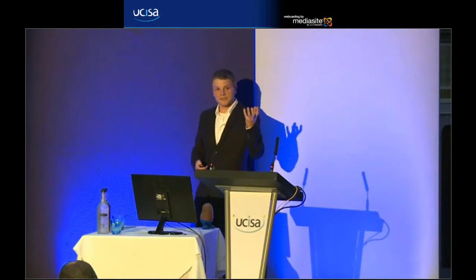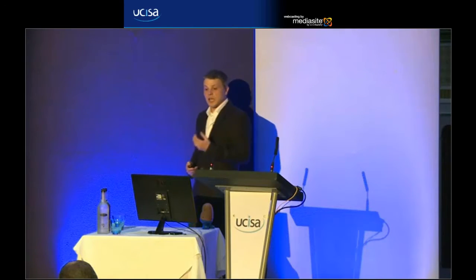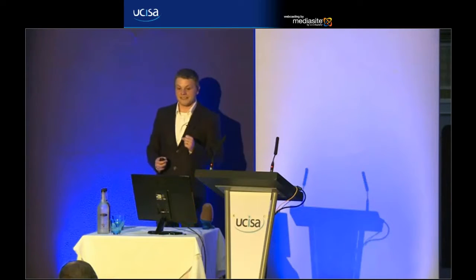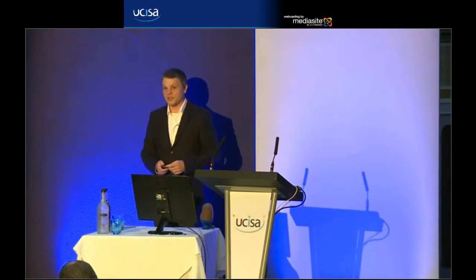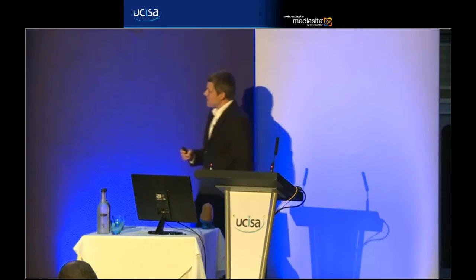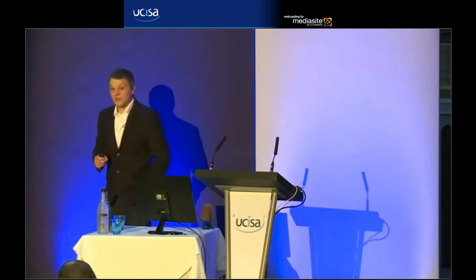And what we do is we pick a certain number of these stories to work on in what we call the sprint. And we break that sprint down into tasks. And these individual tasks we size again in the same way as we did with the initial user stories. And we fix this on a 3-week schedule.